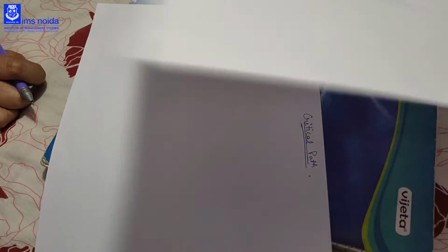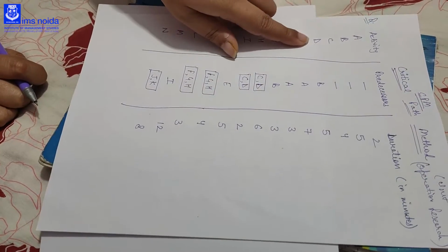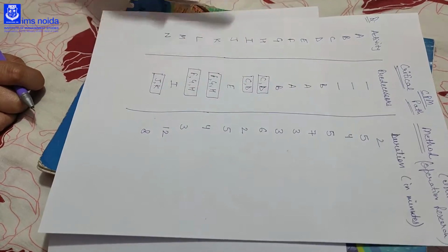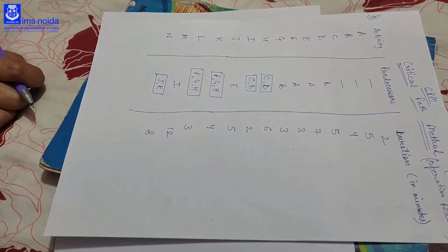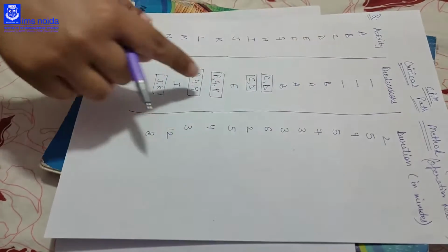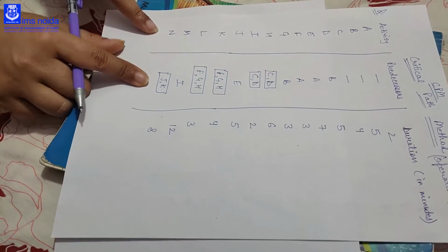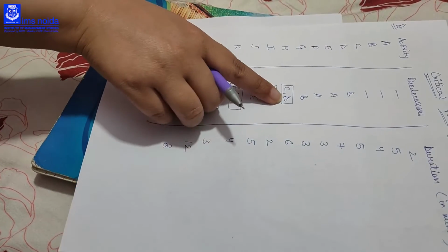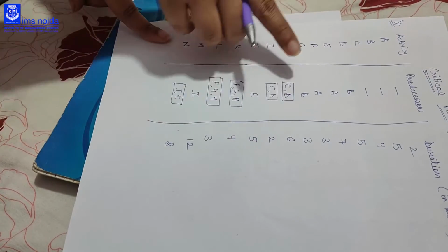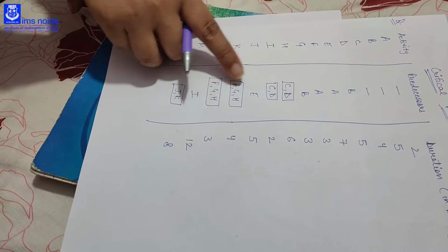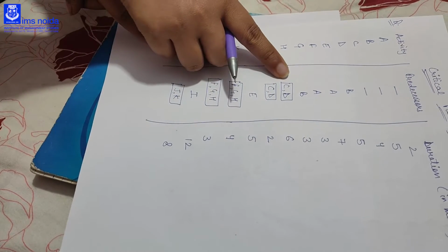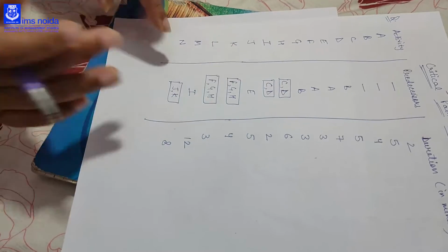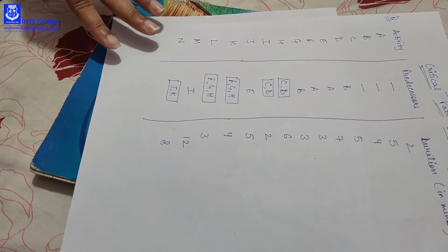Then there is activity D. In D, the predecessor is B. But we have to see whether D is used as a predecessor anywhere. As we can see in the question, D is combined with C. For the activity predecessors which are combined, we will make a box so as to highlight them and remember them while doing the question.